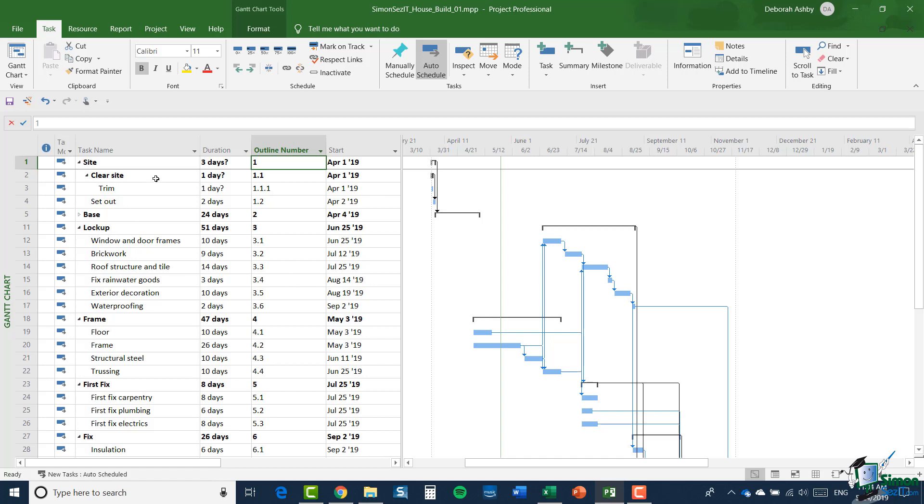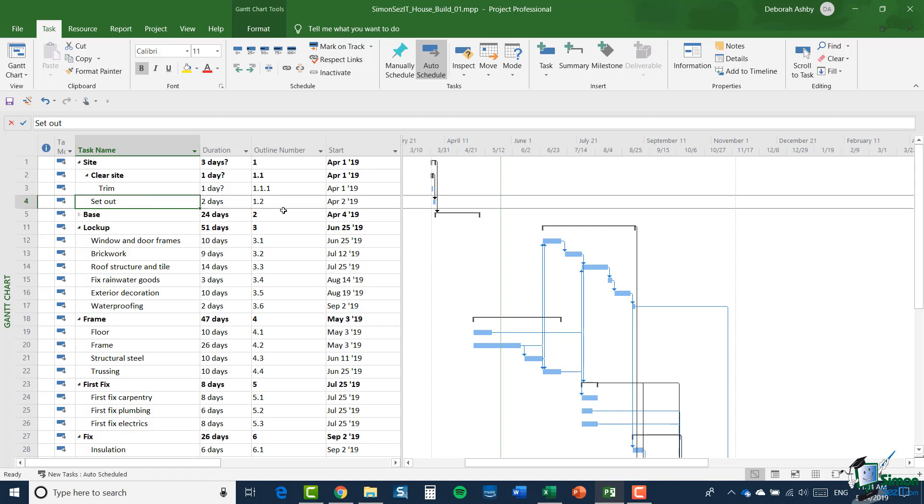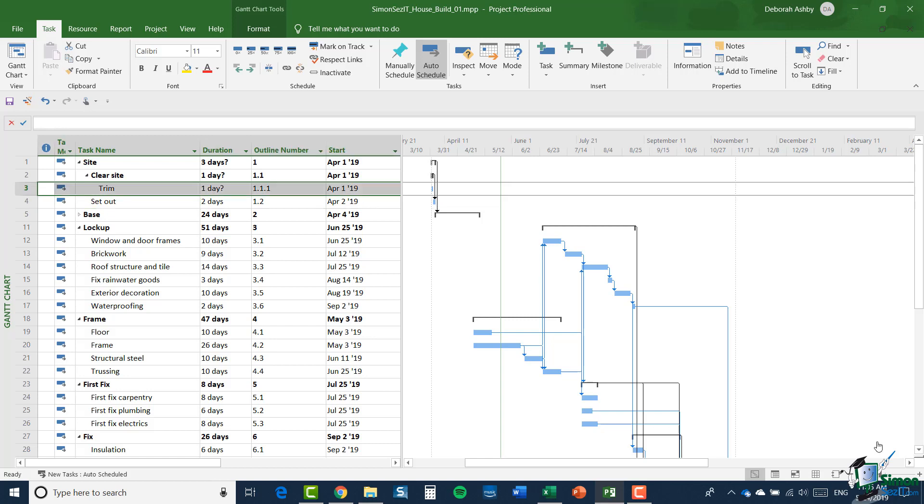So for example, clear site is 1.1, set out is 1.2, and so on. The good news about all of this is that Project 2019 does all the work on maintaining those numbers for you. And for example, if I was to add another subtask underneath clear site, that would take on the numbering format 1.1, 1.2, and so on. So Project 2019 pretty much handles all of this for us, which is great.